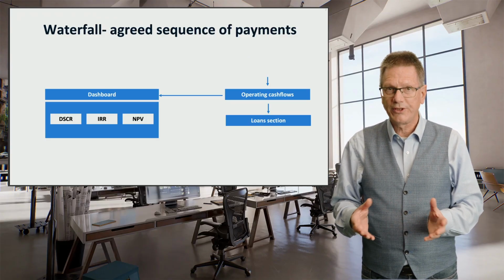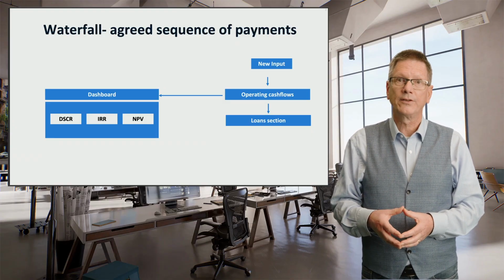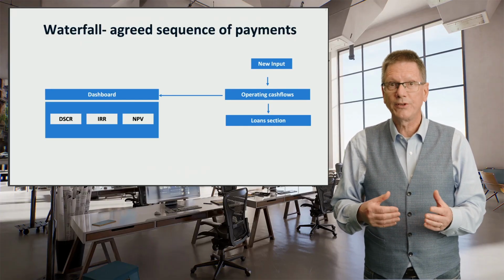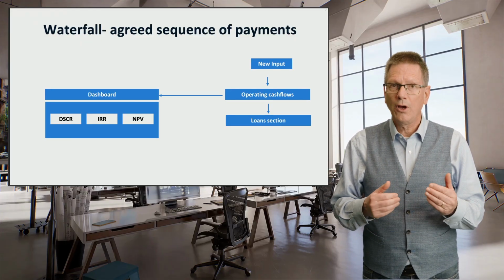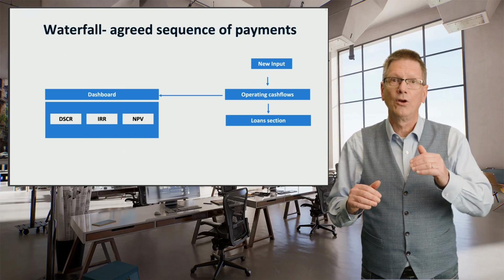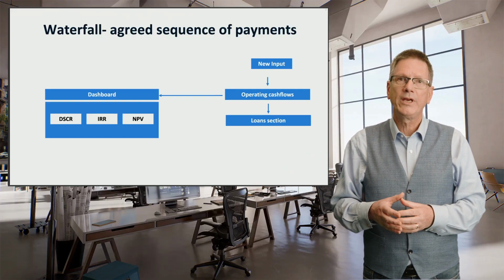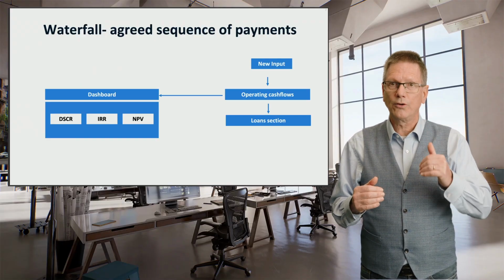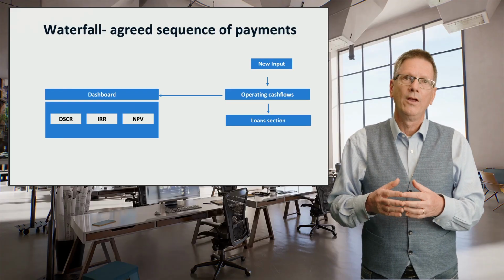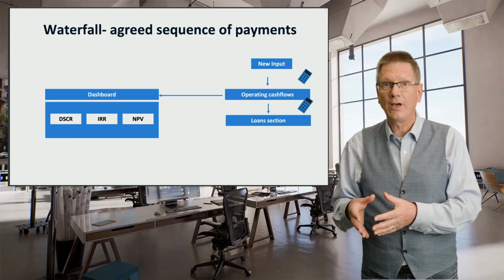The model enables stakeholders to analyse the impact of changes. The dashboard is a useful tool for that. It contains those inputs that we want to analyse. The dashboard enables changes of each input. For example, we could run a scenario that the construction costs increase by 10%, or that the completion period is delayed by 6 months. We can then either change the construction cost input in the model or the completion date in that same model. The model then recalculates the cash flows and shows the resulting changes to these cash flows.